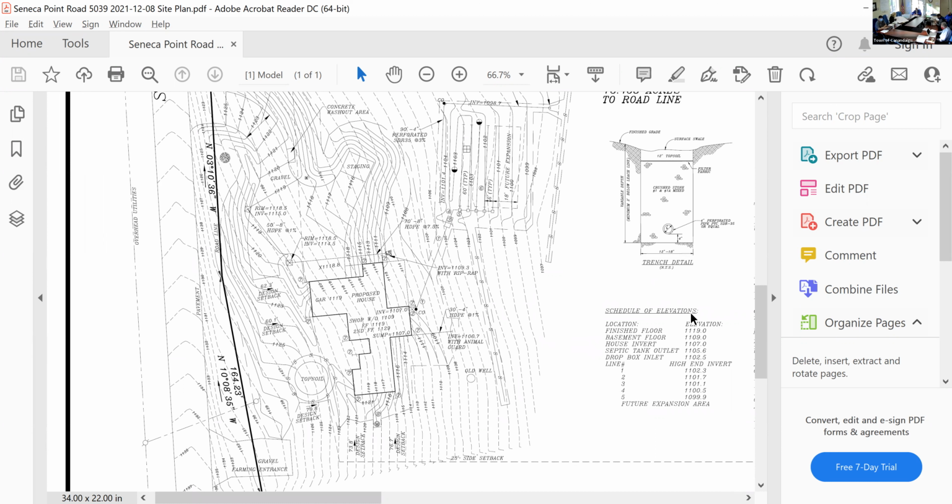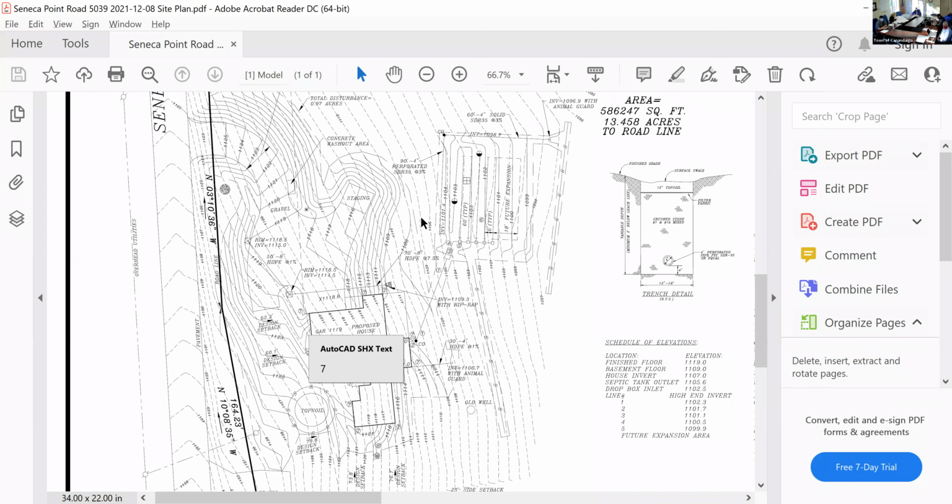He's right on the front setback, like 60. 62, 60.1. So 60.1, so when he really put it on the edge of 60.1, the thing is after it's built, we're gonna ask for an as-built. And if it's 59.99, you're gonna go back to zoning board and stuff like that. So sometimes it's advisable to give yourself a little fuzziness.